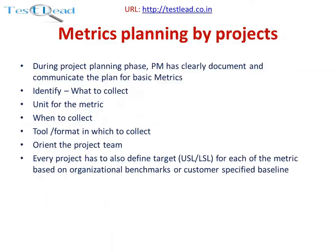What is metrics planning? During the project planning phase, the project manager must clearly document and communicate the plan for basic metrics — such as identifying what to collect, the unit for the metrics, when to collect, the tool or format in which to collect, and how to orient the project team. Every project must also define targets, USL and LSL for each metric based on the organization benchmark or customer-specified baseline.